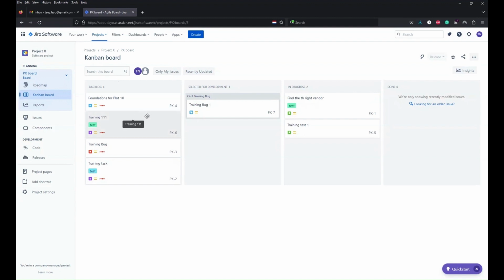Now I'm going to change the configuration of this board and then create a Scrum board so you can see the process of creating a Scrum or creating a Kanban if you want to. Things to note: a project can have multiple boards created in them. The key difference between all those boards will be the unique identifier you would have created to identify the different moving parts within the project or within your team. In this instance, I'm just going to be creating a Scrum board for you.